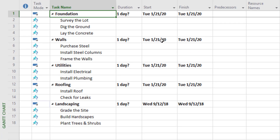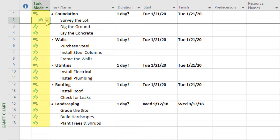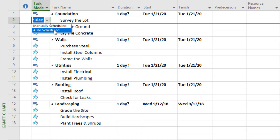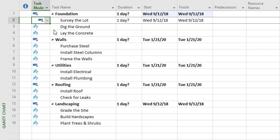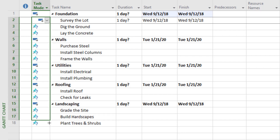The next step is going to seem kind of simple, but it really enables one of the most powerful features of Microsoft Project — it could save you hours and hours of time as you maintain your schedule. What we're going to do is set the task mode from manually scheduled to auto-scheduled for all of our activities. Once we select it for one, we can drag and drop it down our list of activities.